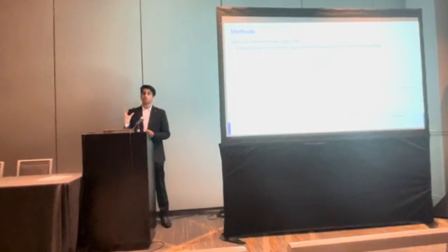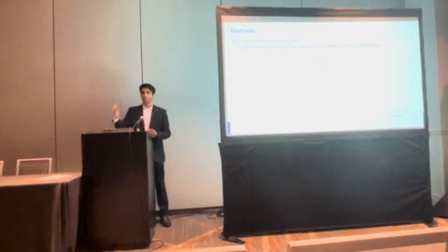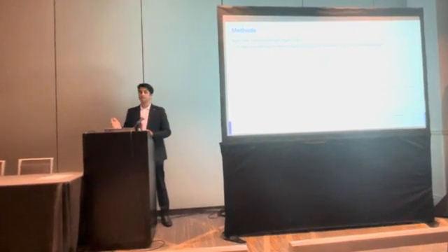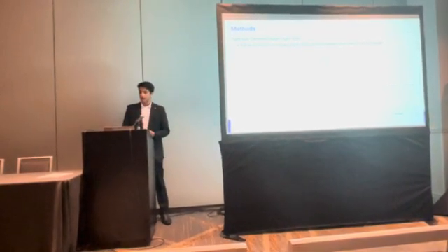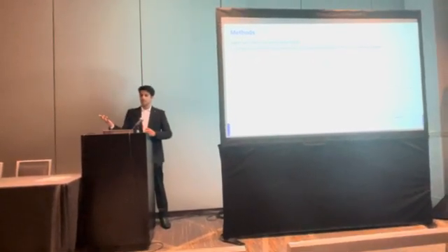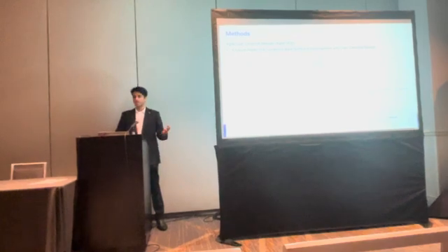And then we also took the evaluation part of the user-centered design and put that after the end of each sprint and also between each phase. And by this, we were able to successfully combine agile software development and user-centered design.